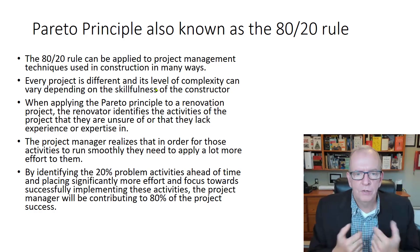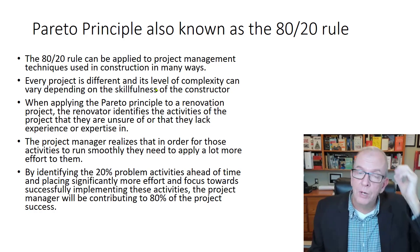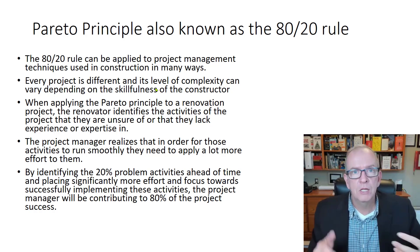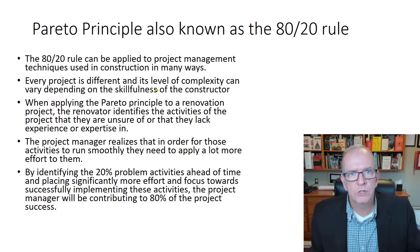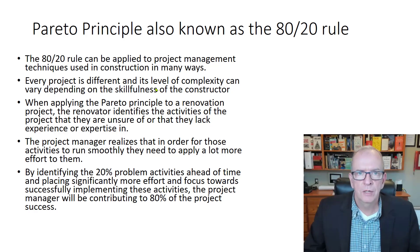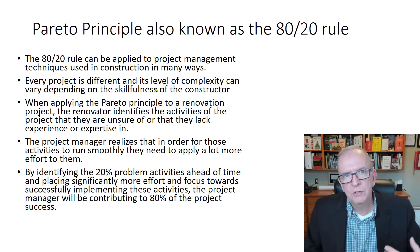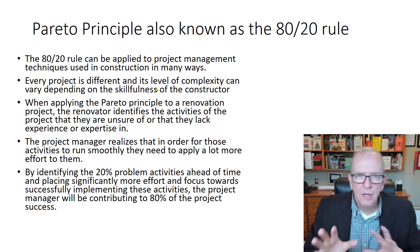If you have a new subcontractor, when you say 20% of your subs take 80% of your time, it might be because they're new — they don't know how you work or your expectations. You might want to spend more time on them so they understand how you operate as a company, from a safety perspective and execution perspective. It may also be a subcontractor you've used before who is problematic; you'd put extra contingencies in place to make sure things flow through.